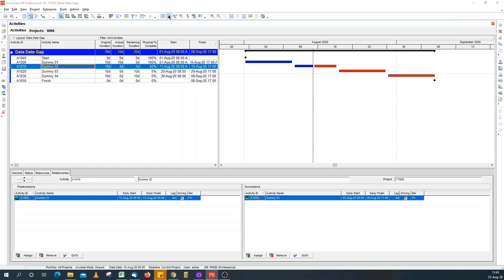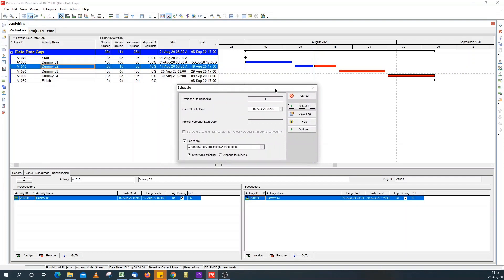So, now we've enabled the time period. If you go back to schedule, you will notice that the current start date is 15th August, which is fine. But the time is 0100 hours. But our calendar, I'm using a standard week calendar, which is 8 hour day. And it starts at 0800 hours and ends at 1700 hours.